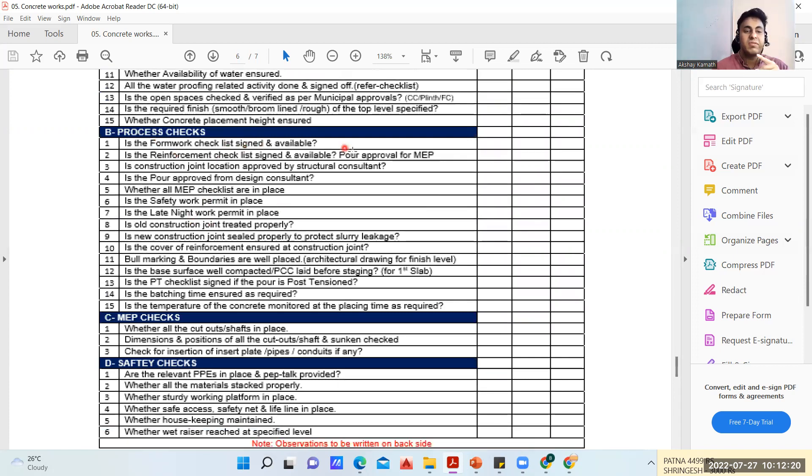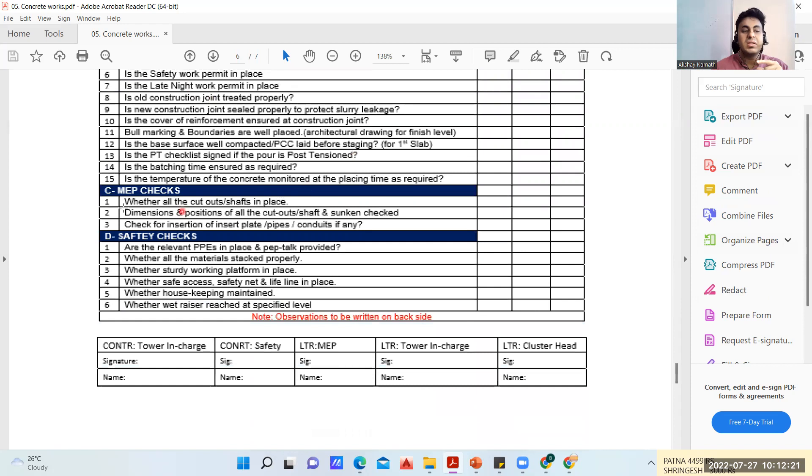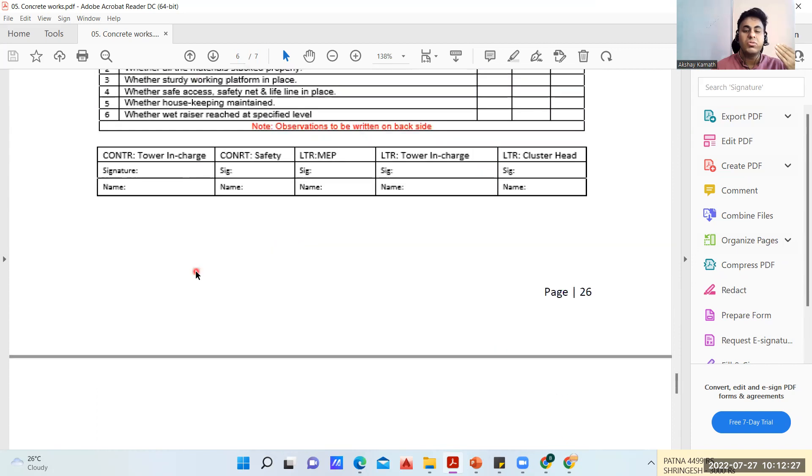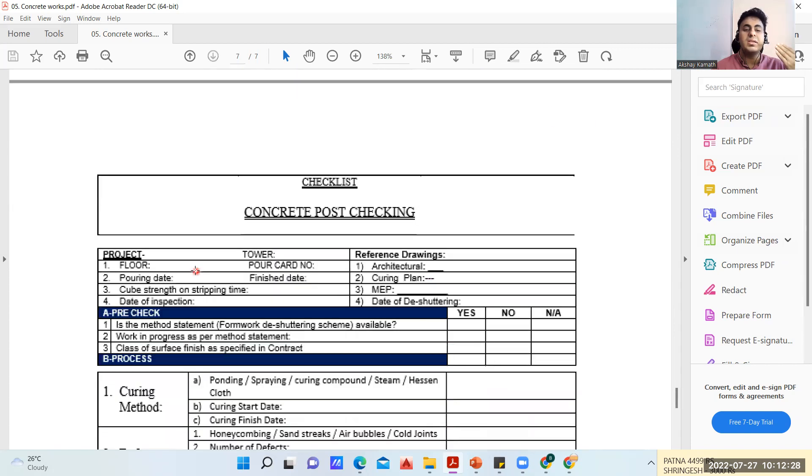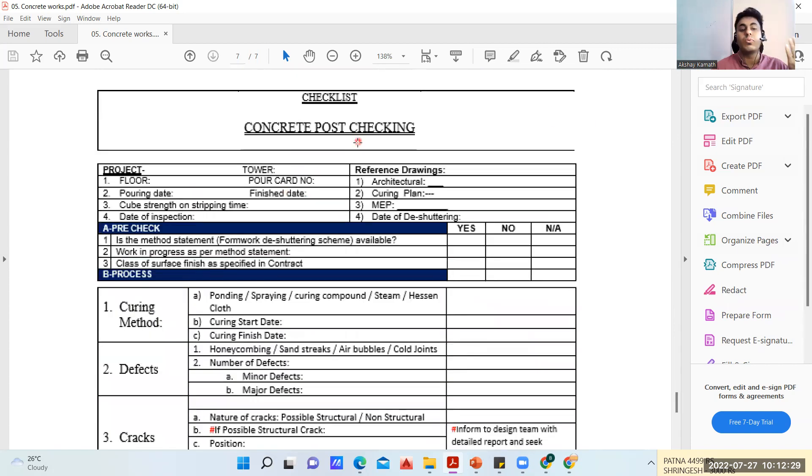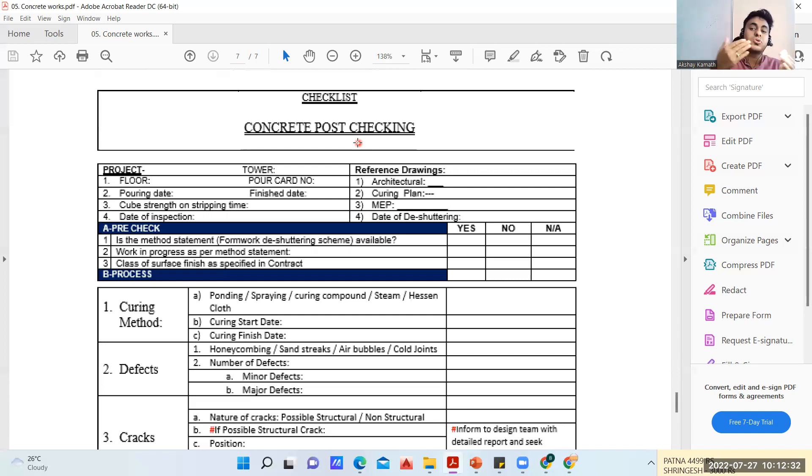These are the process checks at the time of concreting: is the safety work permit in place, is the formwork checklist signed and available. These are your MEP checks which will be done by mechanical, electrical and plumbing people. This is your safety checklist. This is concrete post-checking - once you pour the concrete, after that you're supposed to do the de-shuttering, you're supposed to do the curing activity.